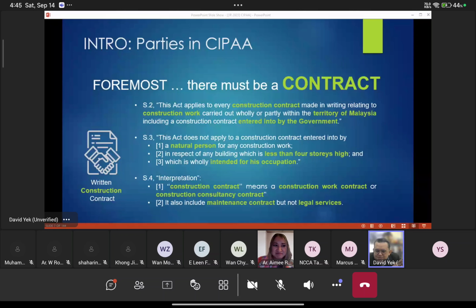There is an amendment to the Arbitration Act, but arbitration is an entirely different creature from adjudication. An arbitrator has the right to decide on his own jurisdiction. An adjudicator doesn't have this. Adjudication jurisdiction is all within that little small book here. They cannot create their own jurisdiction, but an arbitrator can.